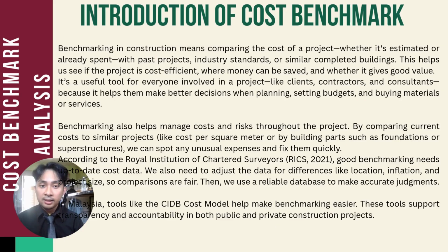successful benchmarking needs several items like up-to-date cost data, adjustment for location, inflation and project size, and a reliable cost database. In Malaysia, we have tools like the CIDB cost model. These tools make benchmarking easier and more consistent. They also promote transparency and accountability, which is especially important in both public and private sector projects.